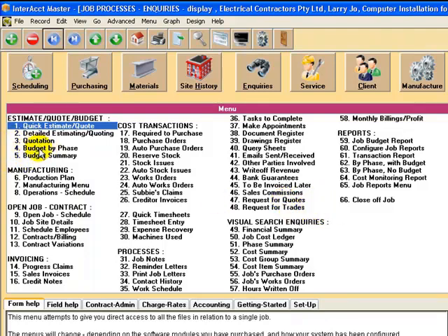If you've got a budget for tradespeople to be involved, you can prepare a request for trade just prior to actually doing a works order or a purchase order. And then of course you can convert that RFQ or RFT, the request for trade, request for quote, just automatically into a purchase order. Saves you having to manually do a purchase order and raise it as a purchase order. Okay, so next what we're going to do is just talk about some of these visual search inquiries.